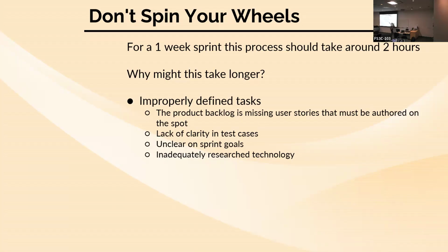Or the biggest one inside of here, inadequately researched technology. Like if you're going to be using the Unity animation system, and then you have the player animation user story in your hands, and everyone's making estimates, and everyone on the team is just like, I don't know, it's a question mark, right? Like I've never done anything in animations. Well, then you've kind of shown a flag that that's the thing you all missed during pre-production, right? Because you should do some research on those things.